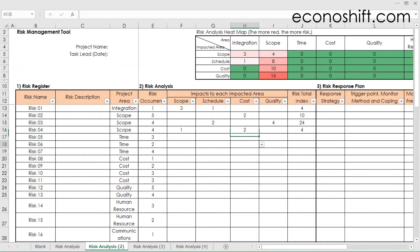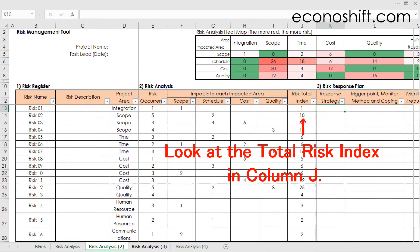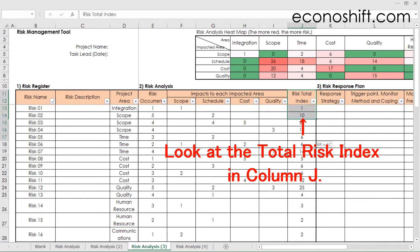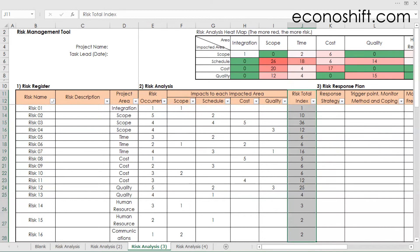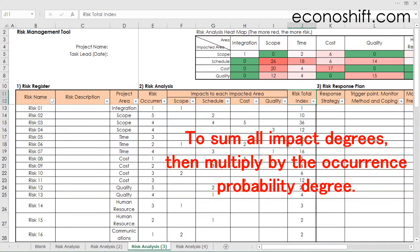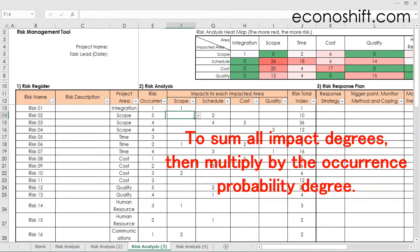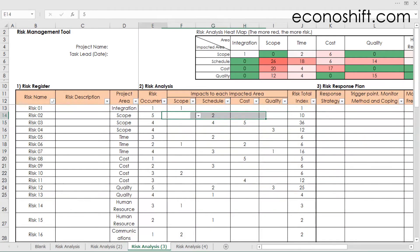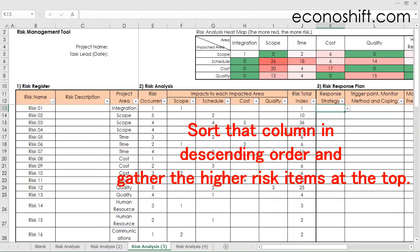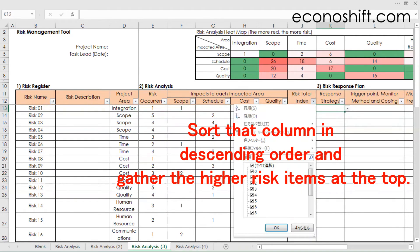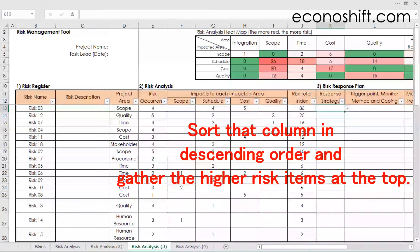After evaluating the impacts for all risk items, look at the total risk index in column J. The total risk index is calculated by summing all impact degrees, then multiplying by the occurrence probability degree. The higher the number, the higher the risk. Sort that column in descending order and gather the higher risk items at the top.